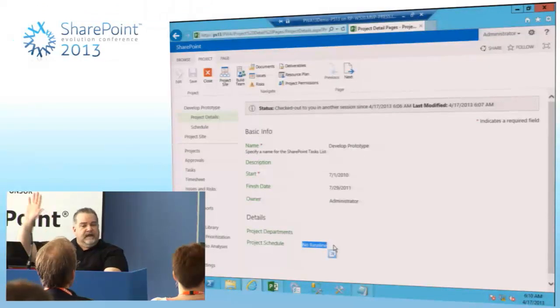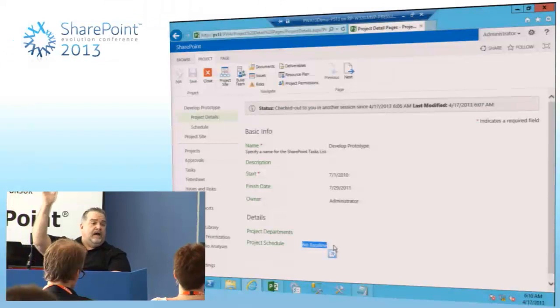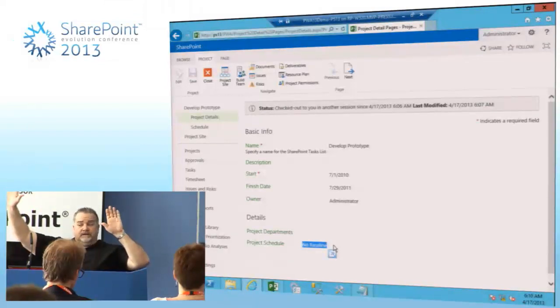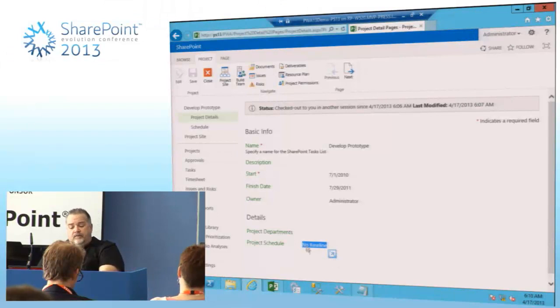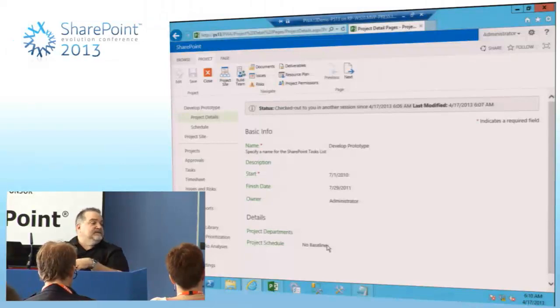Because now you're taking everything that is budgetary, that's in the planning mode, now I'm executing. So now I've got everything locked. This is what you said it was going to cost. This is how long it was going to take. Now I'm going to measure and track actuals on this side. And that's why right here, my little formula says, hey, tell it there's no baseline if it hasn't been done yet. That's all.